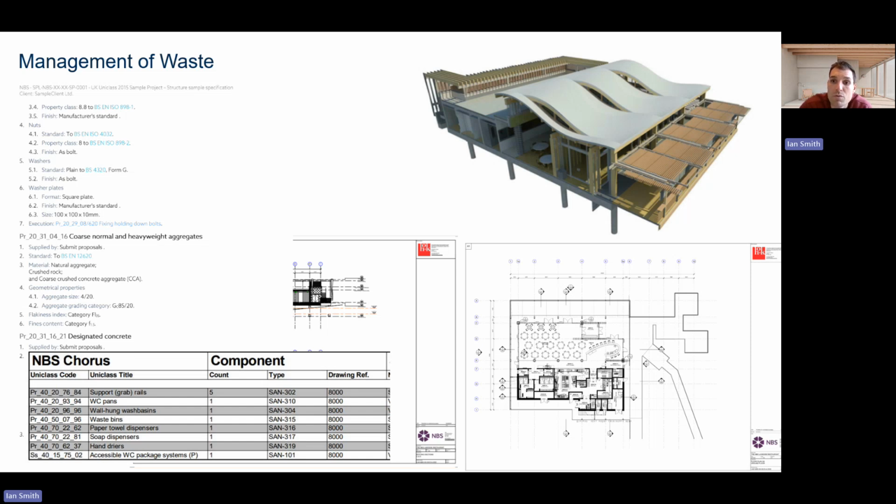When we order our materials to match design requirements, this reduces the need for cutting and trimming, which often creates unnecessary waste, which we'll avoid on this project. Optimising materials is justified because it reduces the volume of unused or cut-off materials that would otherwise become waste, which is damaging both to the environment and to the financial viability of the project.